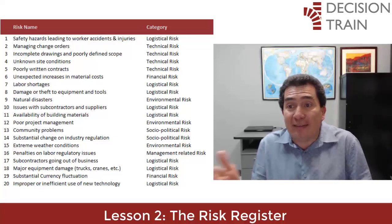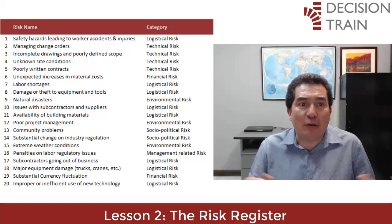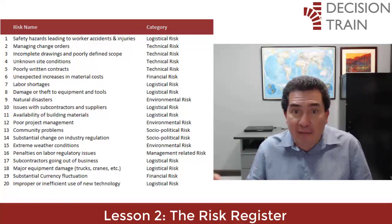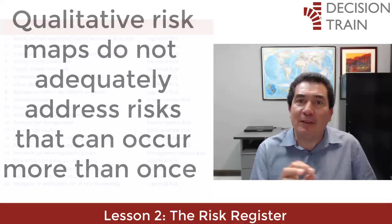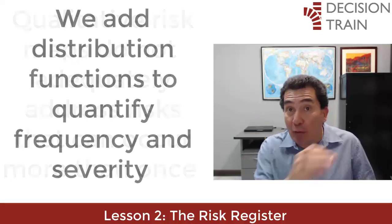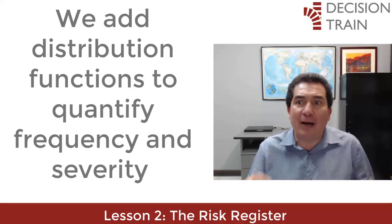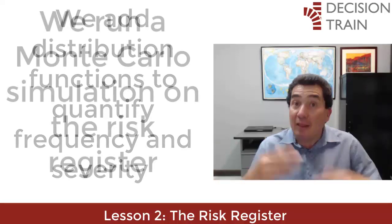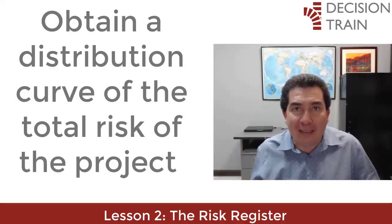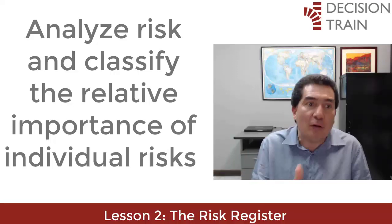Certainly, by the time this list of risks has been created with quality and consistency, many hours and teamwork have passed to agree that these 20 risks adequately represent a comprehensive list. We also assume that the quantification information has been carefully developed. A specific criticism of qualitative risk maps is that they do not adequately address risks that can occur more than once. When we add a probability distribution function to correctly quantify the frequency, we correct for this weakness. We also add distribution functions to quantify the severity or impact of each risk, which allows us to run a Monte Carlo simulation on the risk register and obtain a distribution curve of the total risk of the project. We can then analyze the comprehensive risk of the project and correctly classify the relative importance of each individual risk.